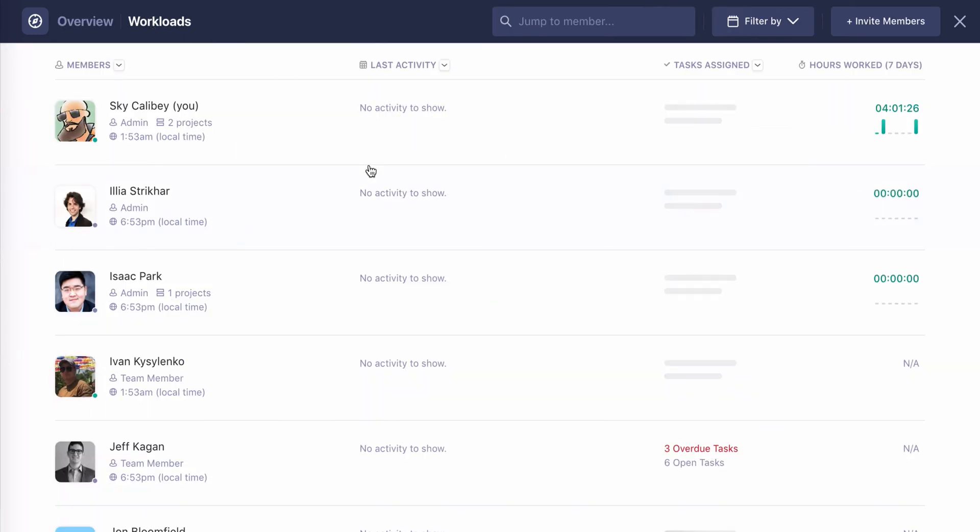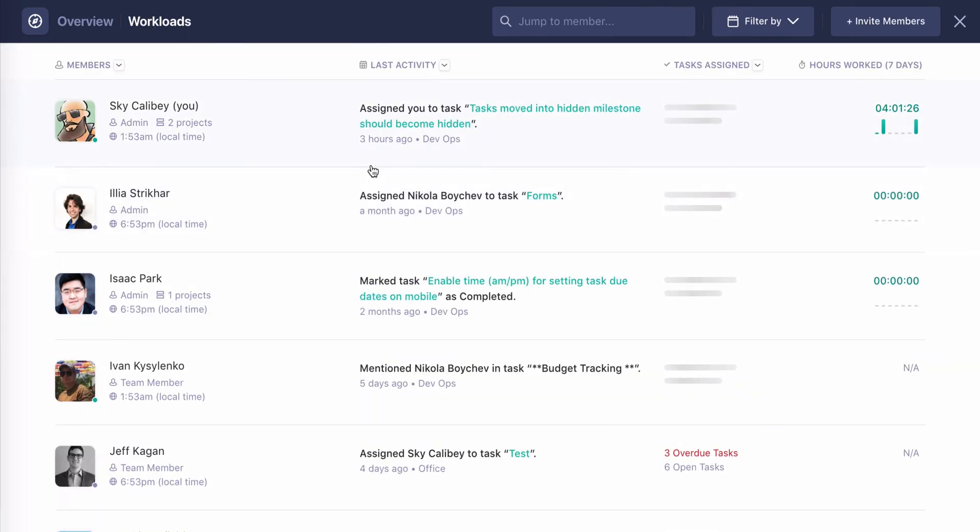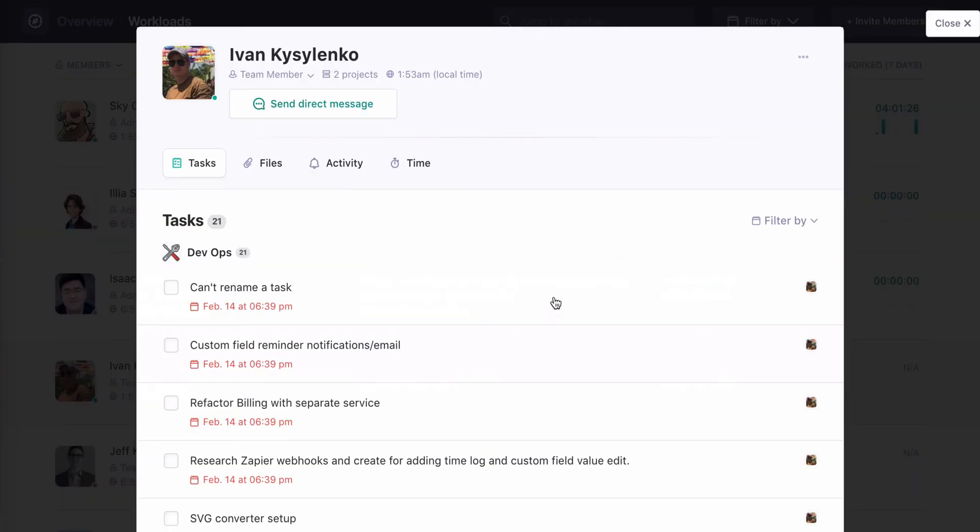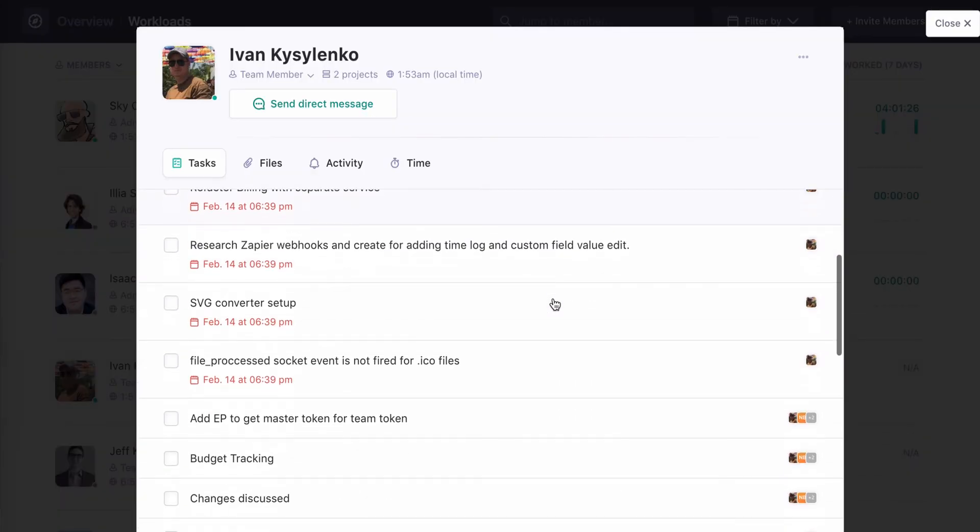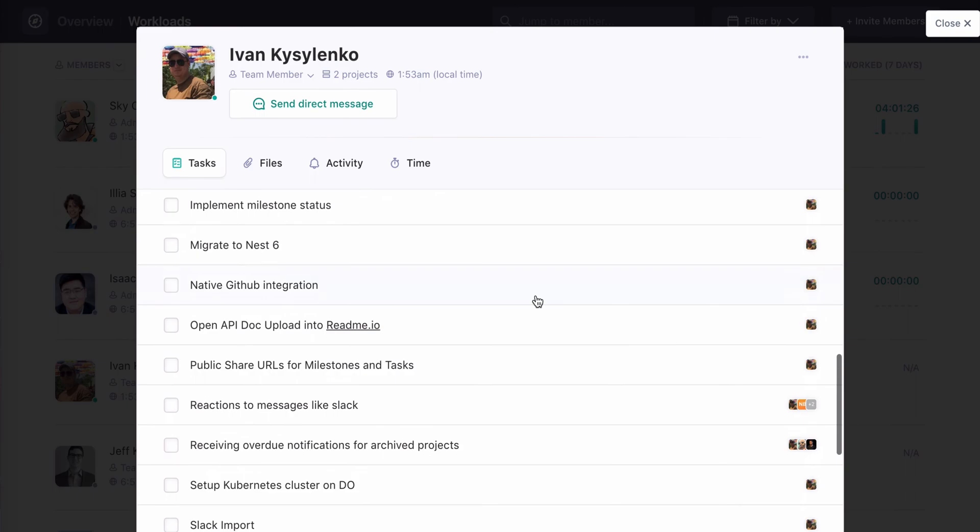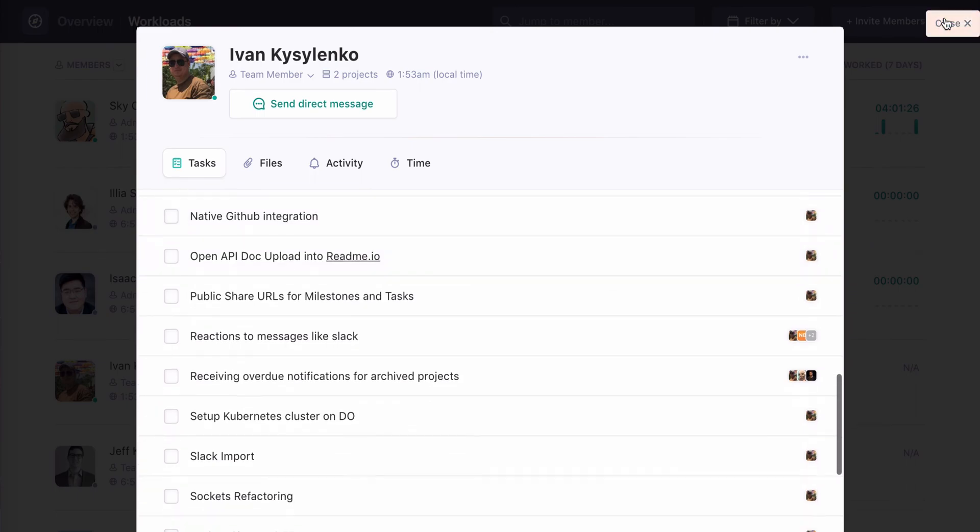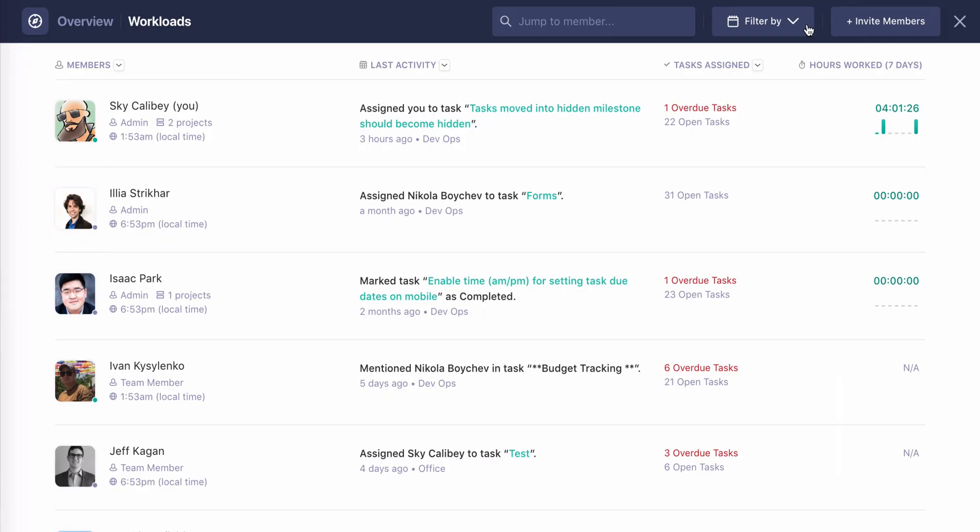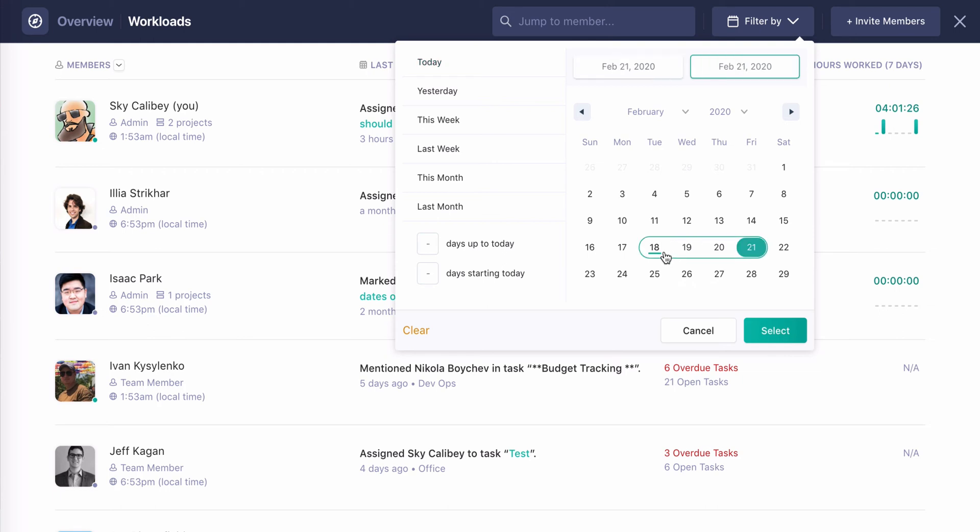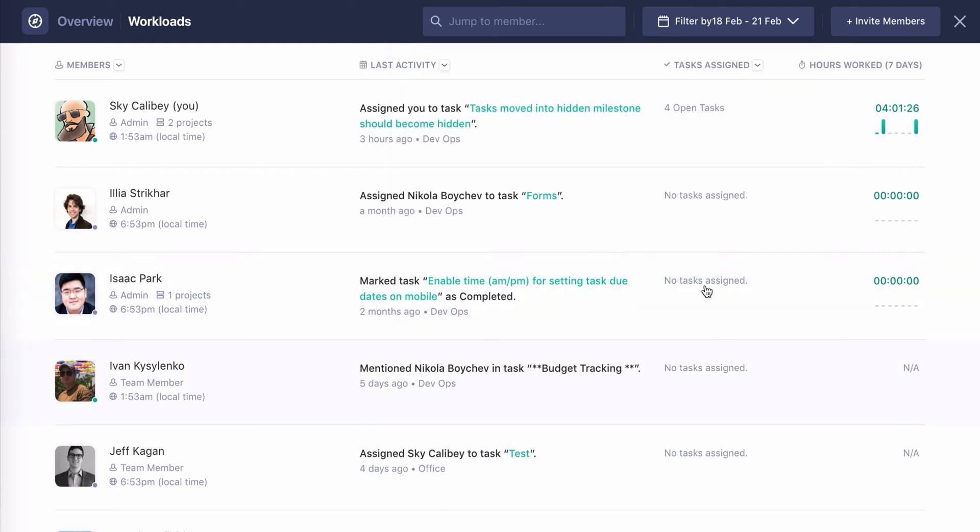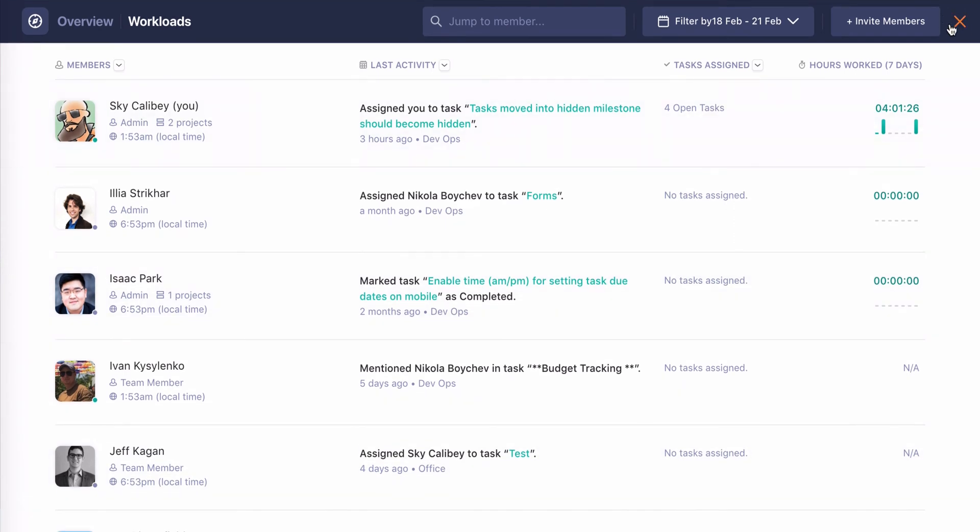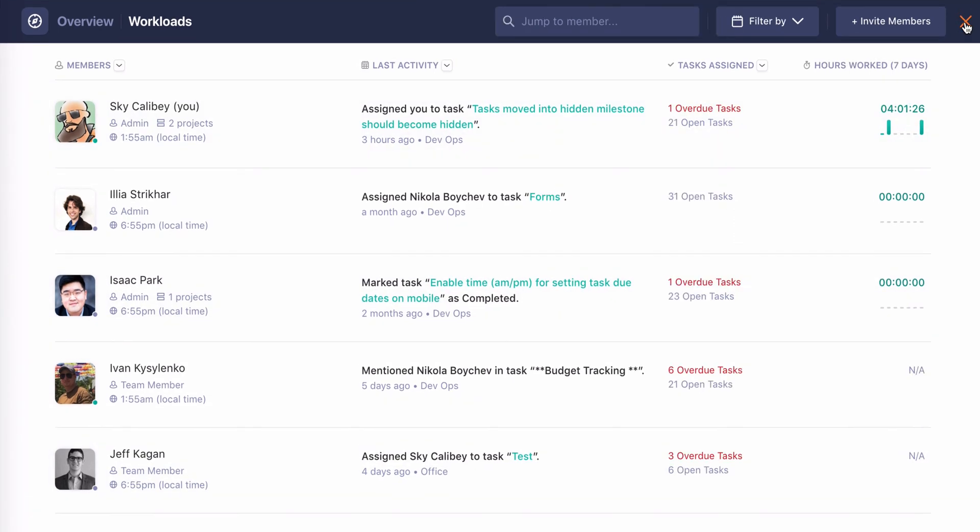Similarly, I can come and engage the workloads on my team through this workloads tool and I can filter this. We can see we all have a few overdue tasks to do. So nobody's perfect, even those who create project management tools. But I can go in and get a sense of what Ivan needs to do across his different projects and what his deadlines are. Similarly, I can go through and filter this by a certain stretch of day. So I want to say, let's just say through the end of this week, I want to see what people's workloads look like. And I can kind of adjust that accordingly. A good way to gauge short and long term work.